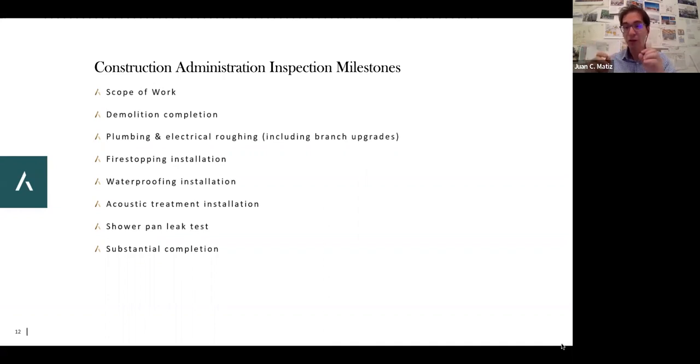Focusing on the apartment renovation though, there's mechanical work. For example, most bathrooms, unless they have a window, will have a vent that goes into a shaft that is eventually the shaft that goes through the building, which is connected to everybody else's bathrooms or apartments or kitchens, depending on what we're talking about. Those technically, if you move them, touch them, et cetera, is mechanical work. That's a special inspection that would require a professional. It could be an engineer or an architect who can sign those off, because you have to be able to do those inspections properly. That's a special inspection that has to be then verified. A professional like myself could say, it's done well. I'm stamping and signing that it's been done correctly, and I'm going to approve the work as it was done. And that's an example of a typical inspection that you might have as a special inspection in an apartment renovation.